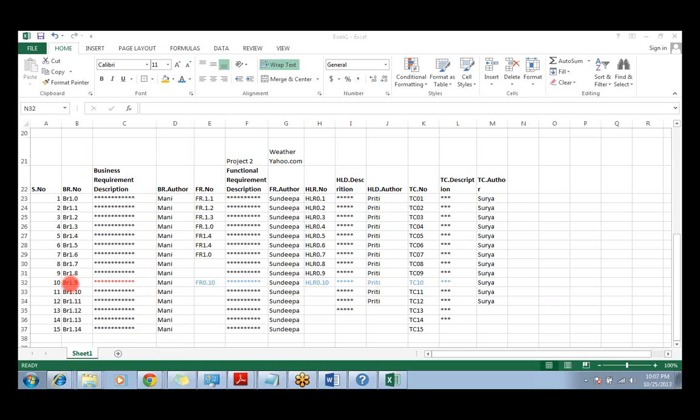So in the document history, you are going to say that you updated BR 1.9. You will put the date, okay, if you updated 1/4/2013, you are going to say that 1/4/2013 BR 1.9 changed. And then the document will get reapproved, redistributed to the same user group. Once you send it out, everyone is directly going to read about what exactly has changed in that version.